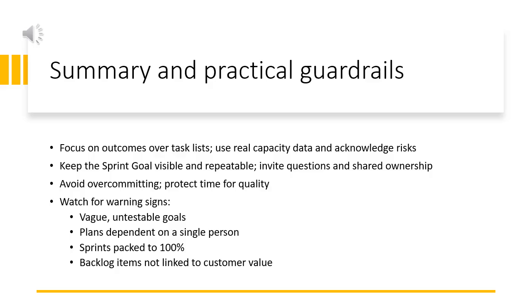Watch for warning signs. Vague goals that no one can test. Plans that depend on one person. Sprints packed at 100%. Backlog items that do not link to value.